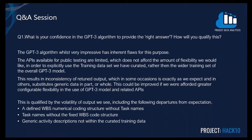Question: what is your confidence in the GPT-3 algorithm to provide the right answer, and how will you qualify this? GPT-3, as we know, is a generative pre-trained transformer that depends on deep learning from user-provided training data sets. In our experience, the GPT-3 algorithm returned a fairly confident output with a few inconsistencies as expected. This could be improved with greater configurable flexibility in the use of GPT-3 models and related APIs. This is qualified by the output we received, including some departures from expectation, such as WBS coding structure without task names, task names without fixed WBS codes, and generic activity descriptions outside the curated data.